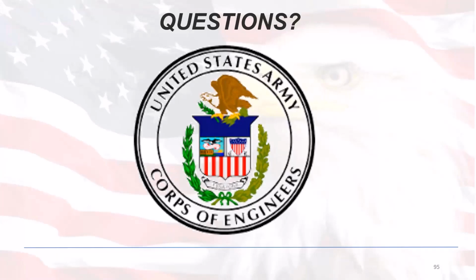It's programmed to say, okay, if something's in RMS that isn't in the SDEF file, it gets wiped out. So that's why whenever we say, if there's a problem with your SDEF file, don't change it in RMS, change it in Primavera, because that's where you'll get it into RMS. Hopefully that answered that question. But yeah, if you're definitely having problems with the comparison report feature, let us know.